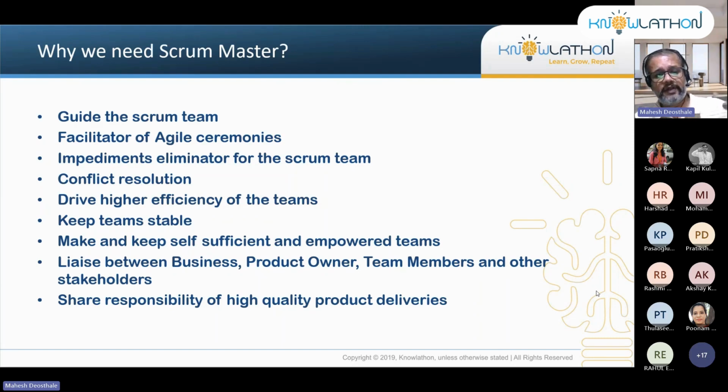So in an earlier slide you saw, right, the business requirements come from the business representatives or the business users, and then the product owner will be defining the product backlogs. Now, take an example. If there is a sprint and some user stories need to be delivered in that sprint, but due to some constraints which could not be eliminated, but were controlled, still some part of the requirement is getting to be a spillover. Then the Scrum Master will liaise with the product owner, if required.